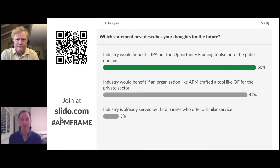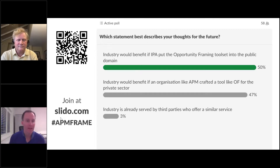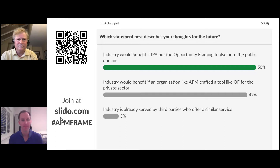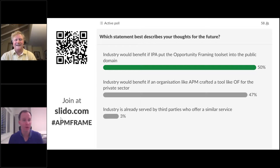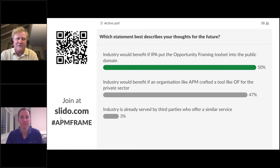Ed's final question: is it a good idea to implement framing in an environment with a relatively low level of decision-maker maturity? Yes — this helps decision makers understand what the project's about, so framing helps decision makers as much as it does the project. Decision makers can be of second quality and yet still benefit from framing. Framing is a good way of making them better. There is a reason we chose opportunity framing among all the things we could have learned from other industries — it has such a wide impact. It involves stakeholders all the way up the chain: the project director, SRO, base governmental representatives, regulators — everyone. It should involve all decision makers in the two-day event. As such, it helps train your decision makers.